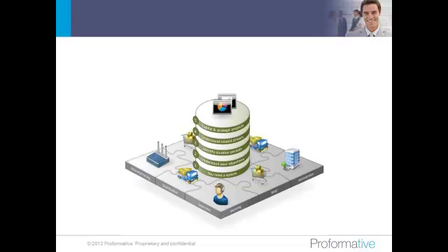So when you're treating them with the same duration as a forecast, it doesn't really provide the complete story around the project. Another requirement that's very unique to these kind of projects is that they typically have a lot of dependencies, which means that project expenditures can move out and in of the plan for a variety of reasons. So think about strategic plans like mergers and acquisitions, or doing a campaign in a certain region, or expanding to a completely new country. Those can move or shift in time as well as in scope.